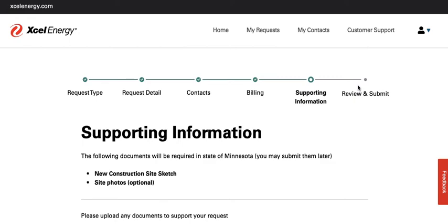So that's one piece that's eliminated when it can all just stay in one track and one lane with the homeowner. And the last piece being at the time of occupancy, when you move into the home, we don't have to be contacting utility companies to update account holder information, update the financials, request last billing dates. It's just a really nice streamlined way that we have found is the best way to manage it for both sides.